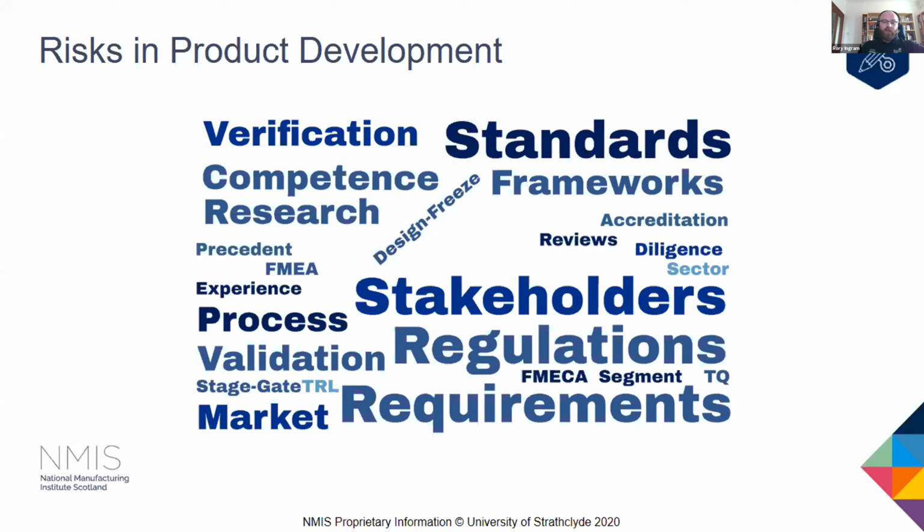outside of this process. And it's advisable to perform failure mode and effects analysis as well at the conceptual phase, whereby you examine the function of each part and identify how it might fail. Then you seek to build in mitigations to eliminate or reduce these failures as your concept evolves. So as your concept evolves, you should update your FMEA or your FMECA results to ensure all components and functions are being considered.